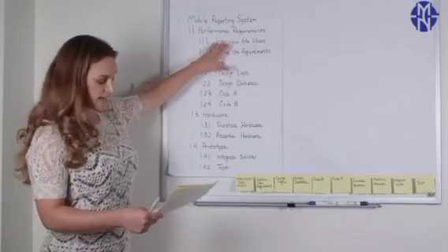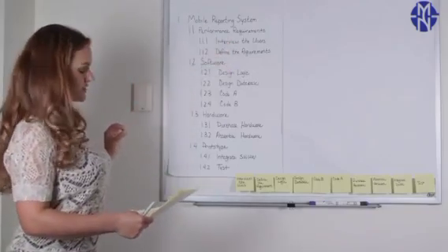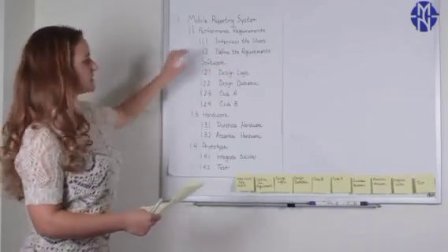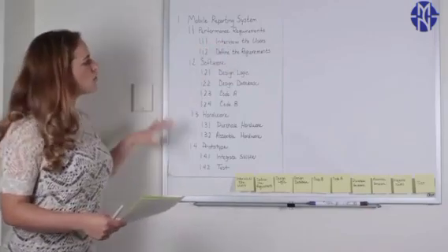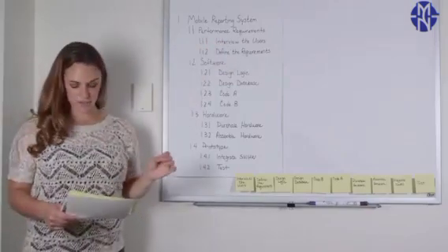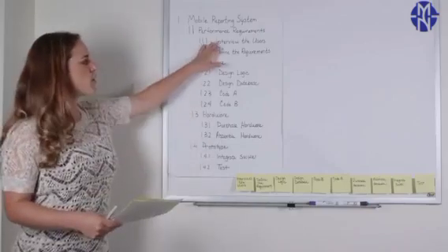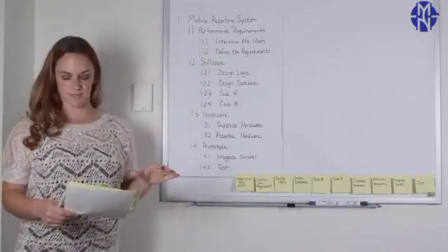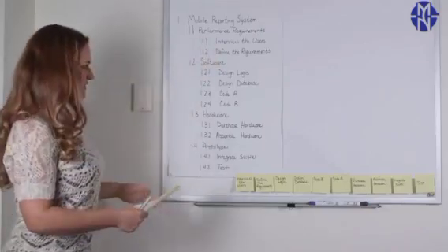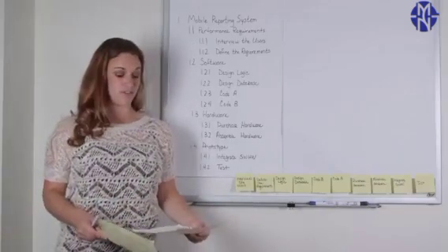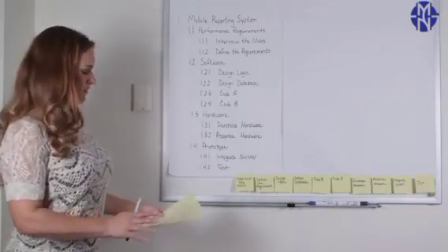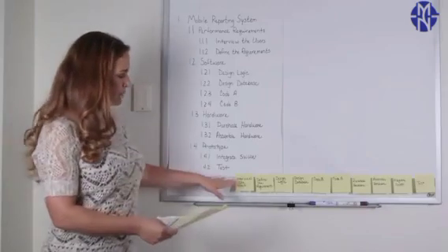It's these work packages that consume the resources, so we'll be using these to build our network diagram and our overall schedule. Although the work breakdown structure is a great tool, it doesn't tell us how these tasks relate to each other. So the next step is to create this network diagram, and I recommend using the yellow sticky approach to do this. The first thing that we need to do is write down all the work packages.